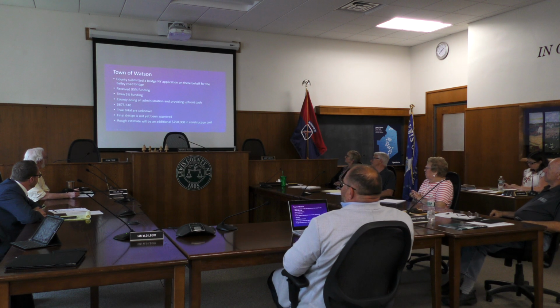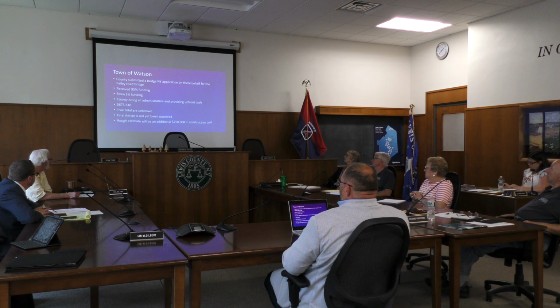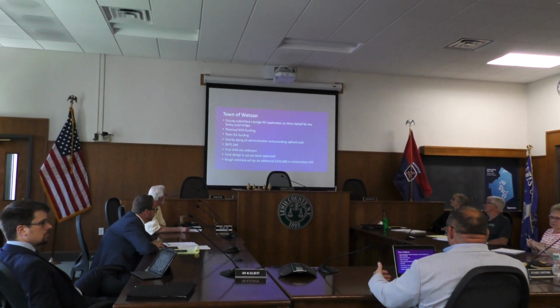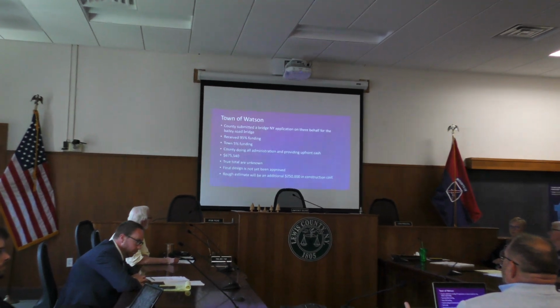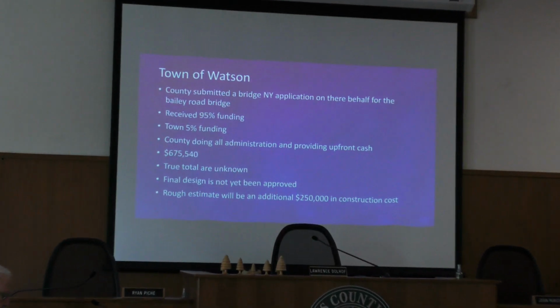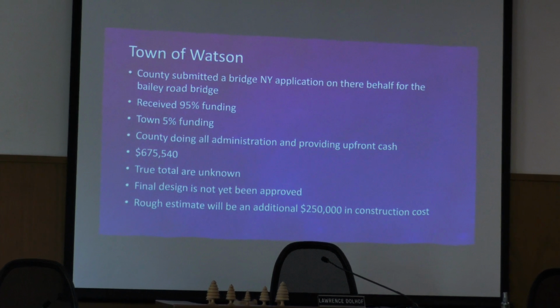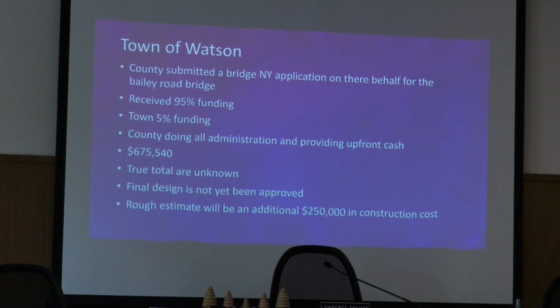Town of Watson. So I had asked the towns if they were interested in submitting a Bridge New York application, and the town of Watson was. They submitted for the Bailey Road Bridge. It's the only bridge in the town of Watson, and we submitted an application on behalf of them. They received funding for that bridge in the amount of $675,000. At the time, that was a pretty accurate estimate.